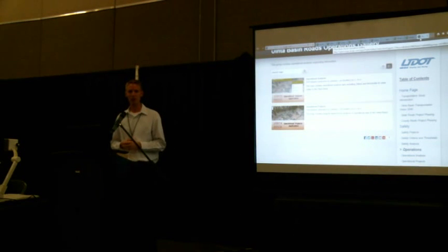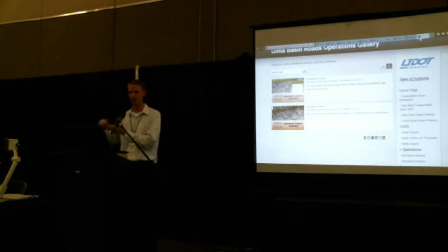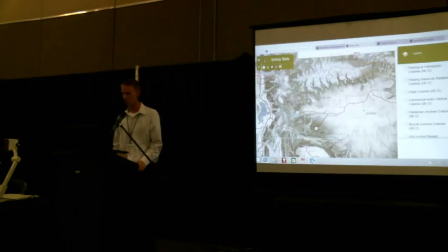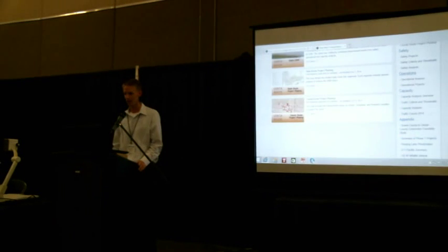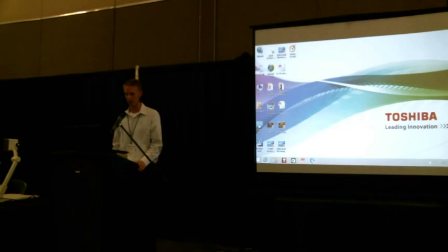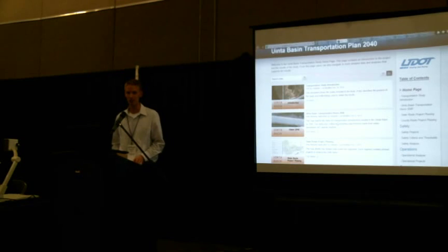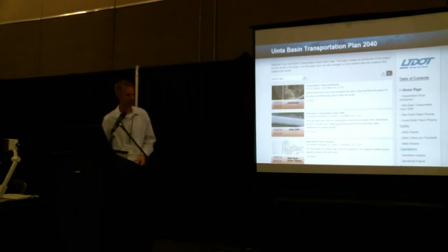Lastly, there was a lot of overlap we found from these 3 prongs: safety, operations, and capacity. Some of these areas got hit multiple times. Safety analysis said there's a need for a passing lane. Capacity analysis says we need some widening within 10 years. And so we started to realize we need a way to plan this out and understand where and when we need to plan and complete projects, which worked towards developing a vision for the highway, which now Dave is going to tell us a little bit more about.